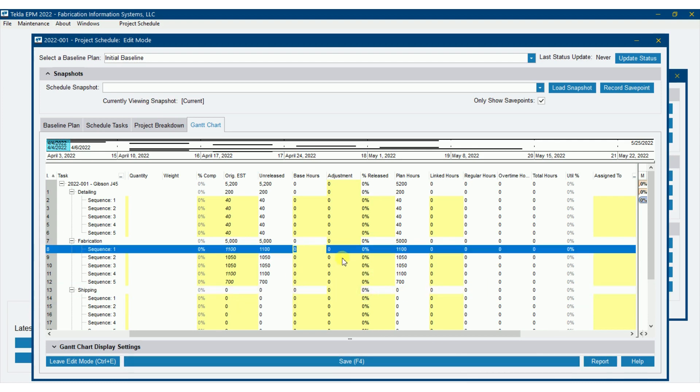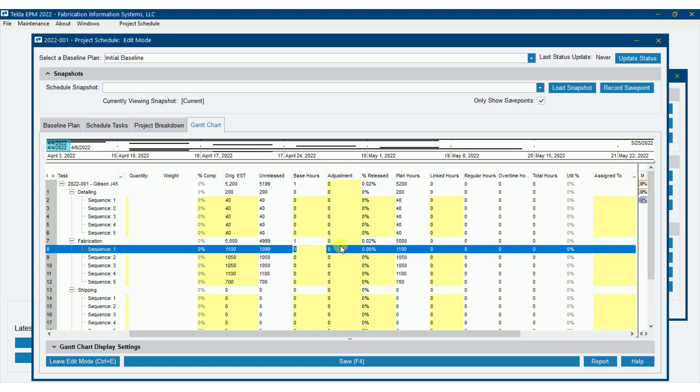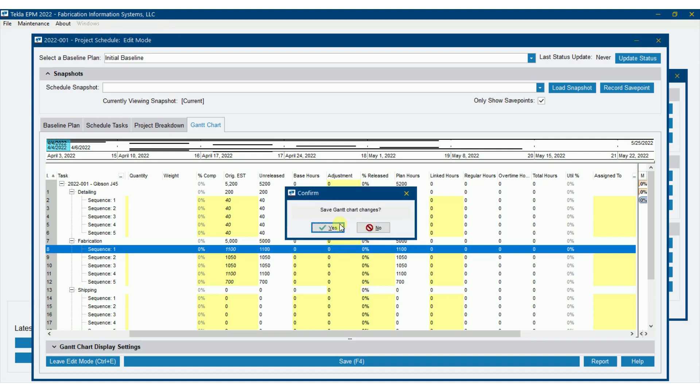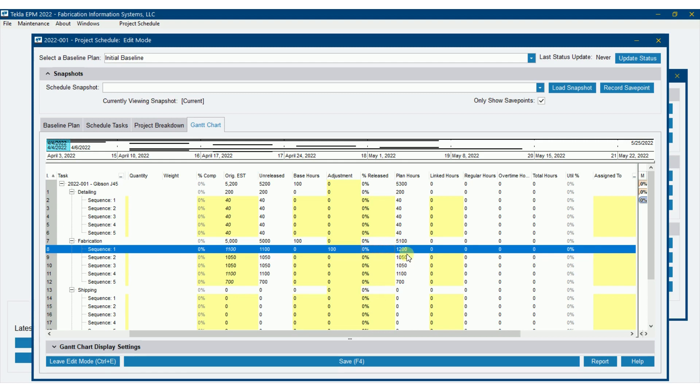The adjustment is if we, let's say we had 100 hours of rework on a project, then I could put in, not in base hours. Say I had 100 hours of rework I needed to do. It adds that 100 hours to my original estimate to give us planned hours of 1,200. This planned hours is what is going to be used on our production schedule based off of our resource, and we'll get there in a subsequent video to this.